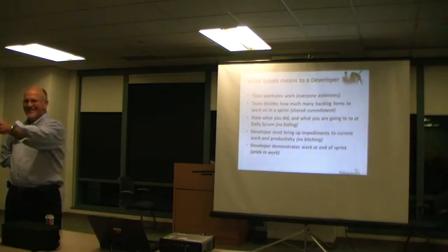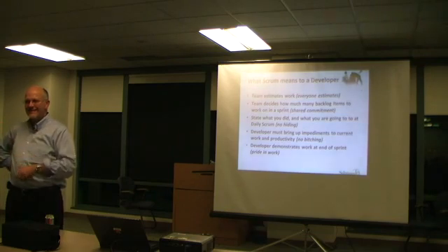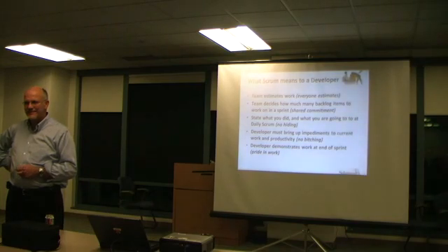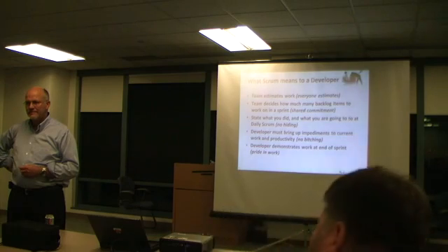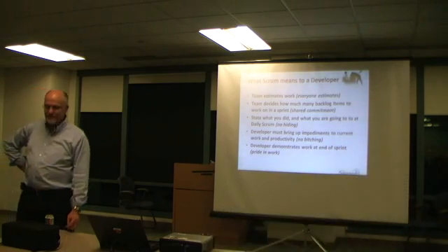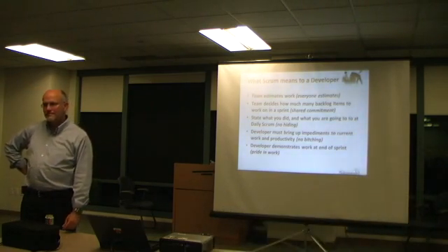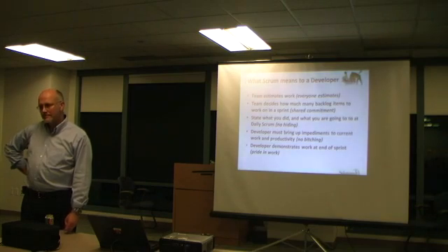Very good. Yes. But I think with the daily Scrum, to go on and on about what you did yesterday just wastes a whole lot of time. Everybody gets really tired of listening to that. So maybe talk a little bit about your progress, but mostly talk about the future and what your issues are, what's stopping you. That's how the meeting should go.